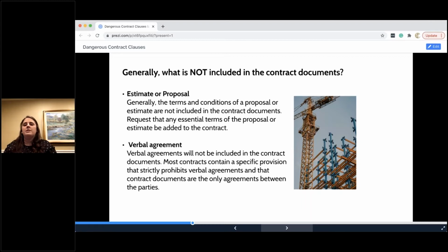Well, what got put into the subcontract was the price for 12 pieces. However, the scope was for all. And all meant going and looking at all of the plans, which was not 12 pieces, it was 39 pieces. And so now my client is doing triple the work for pennies on the dollar in order to prevent getting fired or delay damages or things like that.